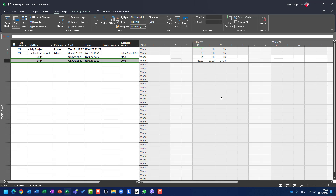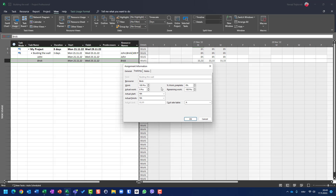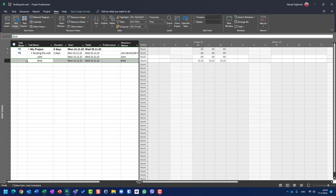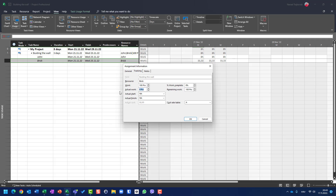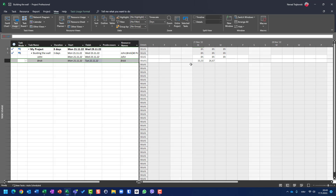I know what you might have expected. You expected that when you enter 60 pieces actual and zero remaining, with a duration of three days, Microsoft Project would distribute it as 20 pieces on Monday, 20 on Tuesday, and 20 on Wednesday. You can expect that, but you will not get it — you will get what I just showed you.